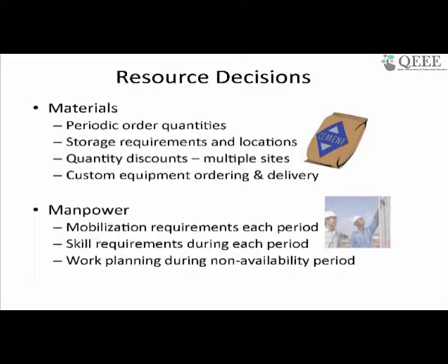And when we talk about custom equipment, I will talk about this. Lead time is extremely important. Several of our common materials, if I give an order, within probably a week or two can be delivered. For example, cement or brick or sand might be possible. But there are other pieces of equipment we will talk about which are not that easy. I need to know when it is required and when it has to be ordered.